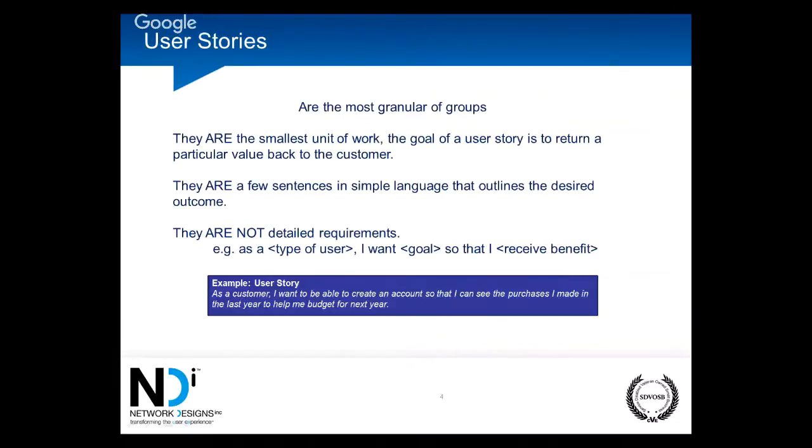But that ready for pulling has to be broken down into validating payment, validating the shipping and billing addresses, validating that the product is in stock and not out of stock. So you could break those three goals down into several sub-stories. So you can expect a project the size of the Amazon web store to have hundreds of stories, even thousands if it's a big enough project. We're not going to write 20 stories and call it good. We're going to write 200 stories and then break those down further if we have to.